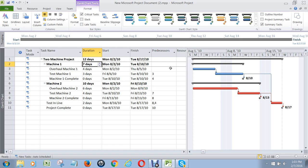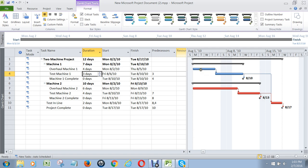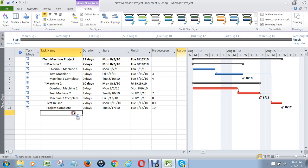However, that's only because these tasks are sequential. If I had another task in here — maybe something that was happening at the same time as this, and it was shorter, maybe only one day — that wouldn't add one day to the machine 1 task because it is absorbed in the total length of the path. It's only what the total length of the path is, not the sum of all the activities within the path, which may overlap at times. That's another point of confusion.